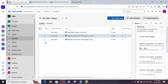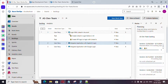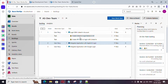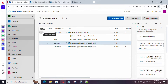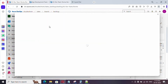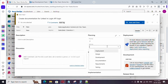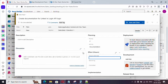Now let's move to the second part of sprint planning. The team will suggest the tasks to be done for each user story and provide estimates. For example, for 'Login with LinkedIn' I have already created two tasks, and the team is suggesting we may need two more tasks for documentation. Let me add a task by clicking the plus icon and selecting Task. The team can add a description and set the activity type — for example, documentation, development, or design — from the dropdown.